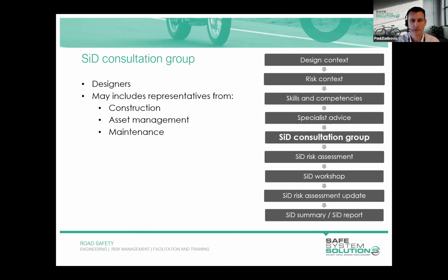Once you've identified the need, all the skills required, and any specialist advice that may need to be called upon, we're going to establish something which we've termed a safety and design consultation group. It's going to include your designers to represent all the skill areas associated with a design, and also representatives from construction, asset maintenance, and asset management.